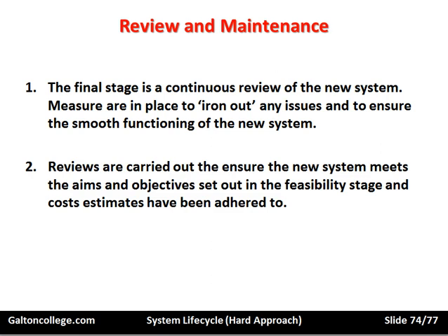Reviews should be carried out to ensure that the new system meets the aims and objectives set out in the feasibility stage, and cost estimates have been adhered to. So it's important that the cost of the new system is monitored, there's a budget, and that the system is brought in at budget or just perhaps under budget. If it's significantly above budget, then management needs to inquire as to why the budget estimates were so far out.